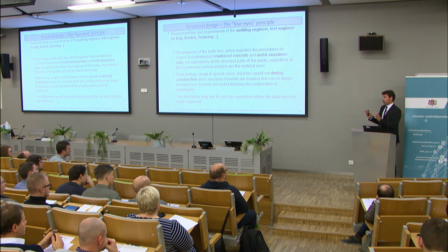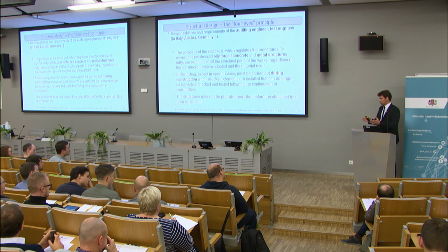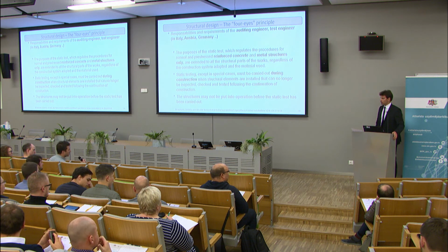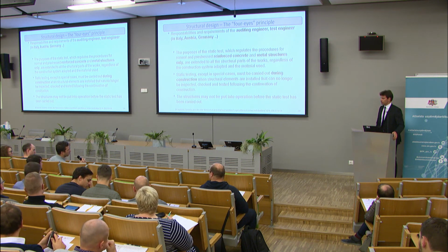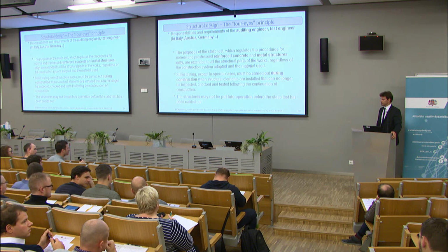This is one person. The other independent actor is the supervision on site during construction. For example, in Linz there is an external company that is checking everything. They come there during execution and control that the construction company does everything properly. So they do not double down on supervision? They do an extra supervision. Okay, thanks.